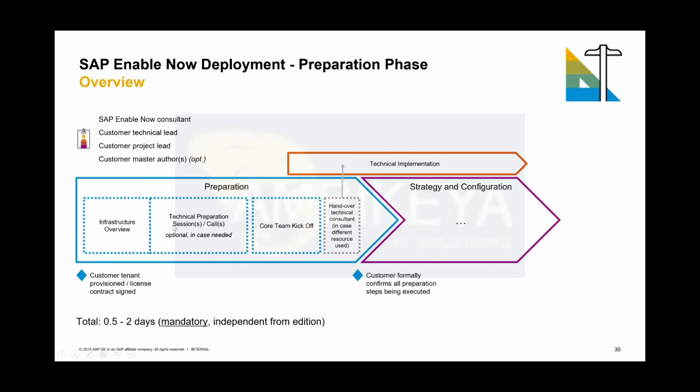So this belongs together. Then we have the core team kickoff, which is basically the preparation of the more strategical, more conceptual work that takes place, and setting the awareness of what needs to be done. Those 2 blocks are mandatory. Recommendation, as mentioned earlier, is to deliver this as a standardized remote session.